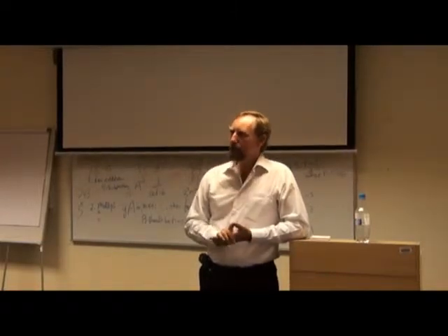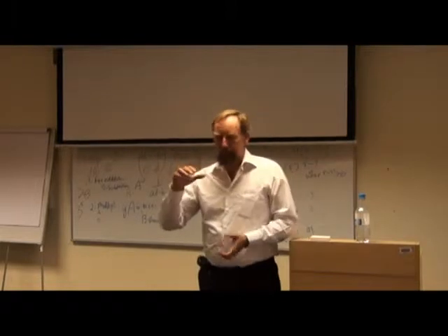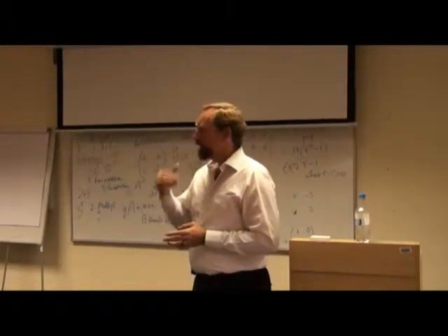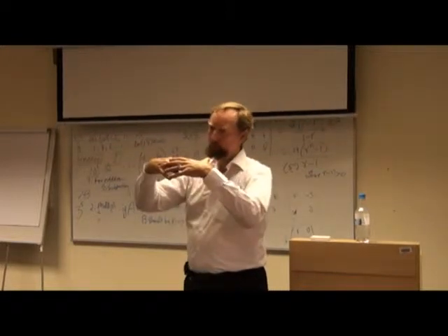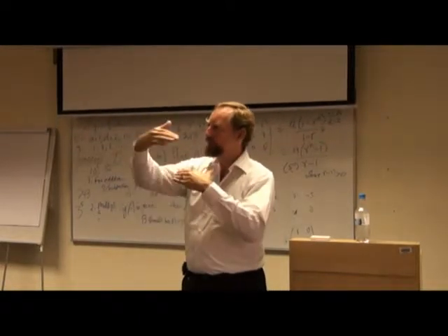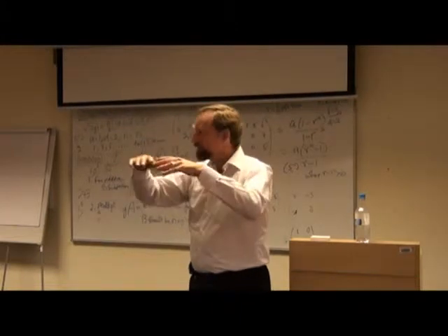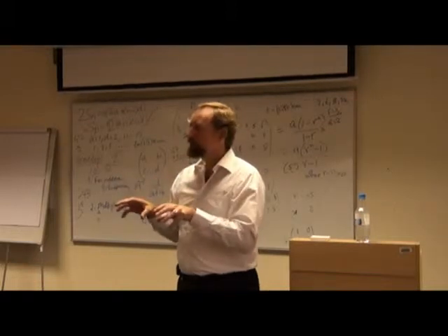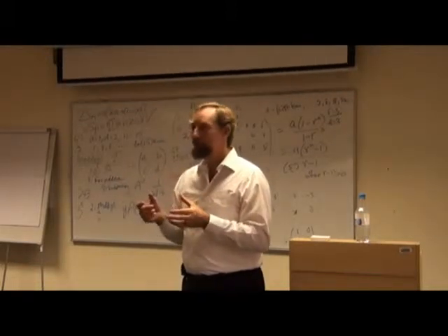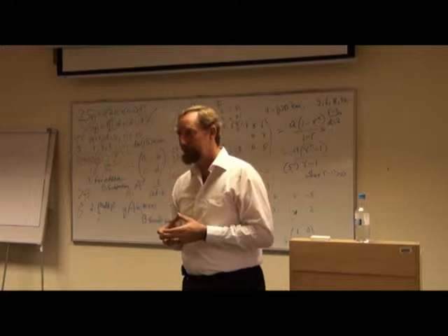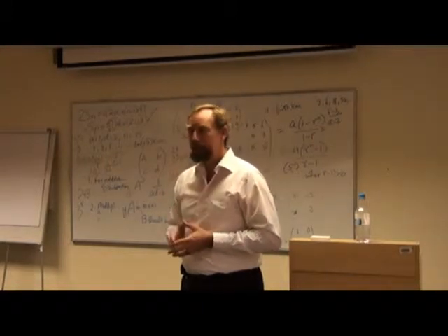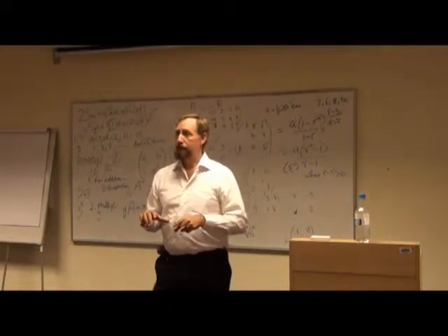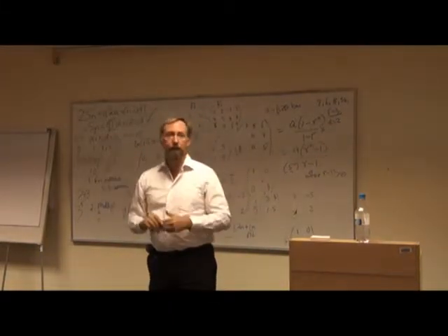During the negotiations, yes, let me explain one other thing that I mentioned yesterday already. This is the contract between the whole consortium and the coordinator with the European Commission. That is like a framework contract. But underneath there you have the different partners, and you need to agree among the partners how you collaborate together. And that is agreed in the consortium agreement. So that is a separate contract underneath the contract with the European Commission.